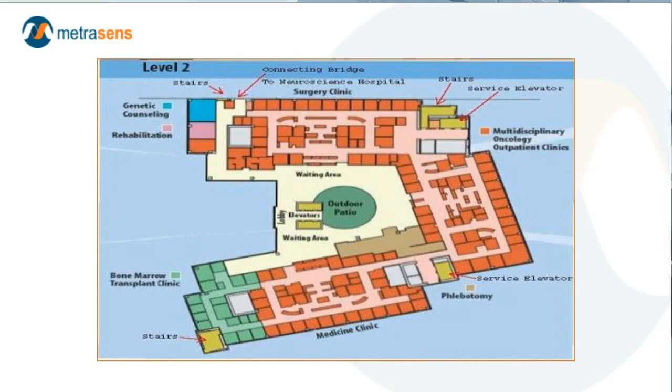So here's another potential example, and one that I was involved in early on before the first edition. If this were a live presentation with an audience, I'd be asking, raise your hand, what's wrong with this design? I'll just tell you up front that the stairwells were placed in such a manner that this was 5 or 6 floors of clinics, with inpatient units on the top 2 floors, and the stairwells were designed too far away from the elevators, so the access to the stairwells had to be open. This was discovered during the design project, but too late to change the positioning of the elevators.